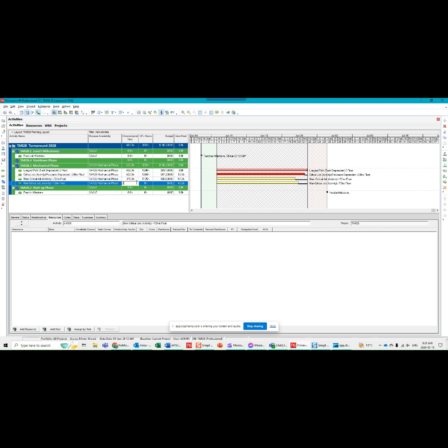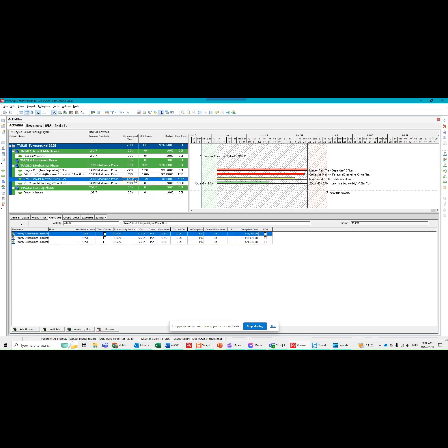So when I go back to look at the float remaining is greater than 72 hours, I'm in good shape here. Even though I don't want to burn float, I do have the opportunity for this activity either to start later and finish later, which is not burning float. But if it has started and it continues to drag on, then I am truly burning float, which is expensive. So again, if this activity becomes a lesser amount of remaining float, then things are going to start to turn red.